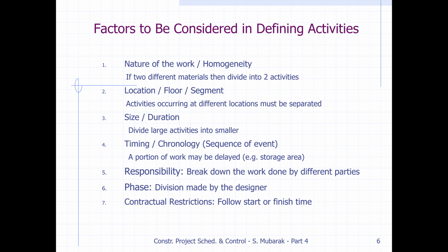Then there are sometimes contractual restrictions, to follow the start or finish time given from the owner side. Usually we keep the start time, then we prepare the schedule and see how it's going to match with the finish time.